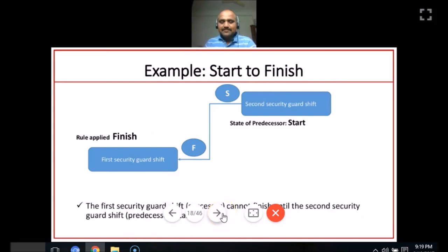Here, for example, we have a thermal power station, and we have the morning shift, the first shift, which starts at 6 a.m. till 2 p.m., and the second shift from 2 p.m. to 10 p.m. Now, when we set up a relationship called start to finish, where your predecessor activity is the second shift, 2 p.m. to 10 p.m., unless the second shift person comes and takes over the charge, the first shift person cannot finish